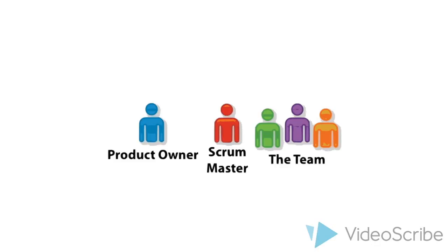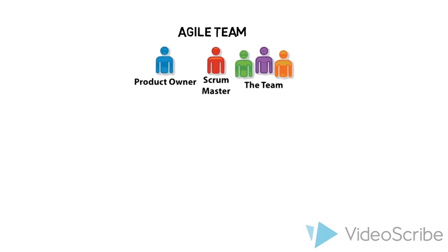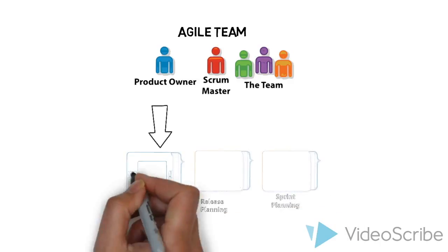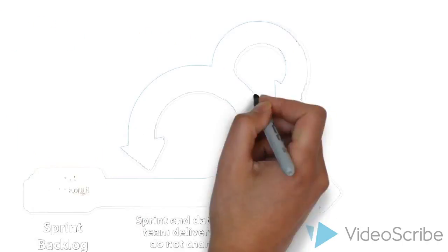RACM and DART teams got together to form the Agile Scrum team, consisting of product owner, Scrum Master, developer, and members. The product owner gathered all the user requirements and ranked them based on the highest priority to form the backlog. The team planned the releases, sprints, and deliverables, which can change over time depending on user requirements and progress.